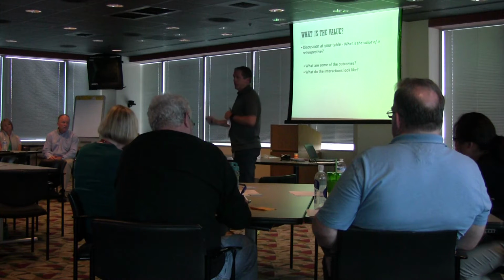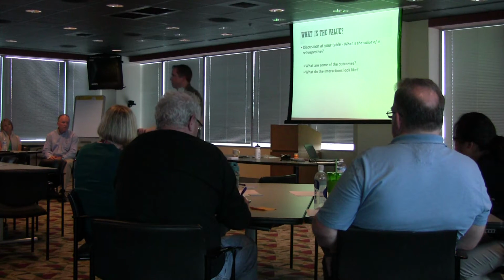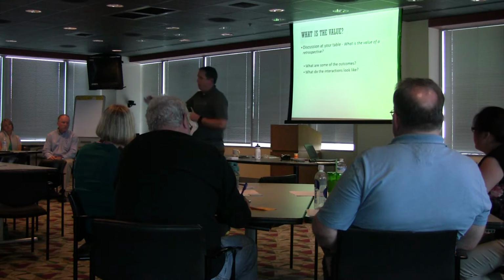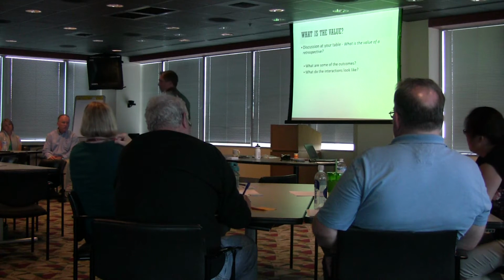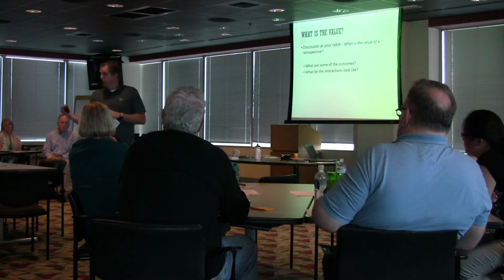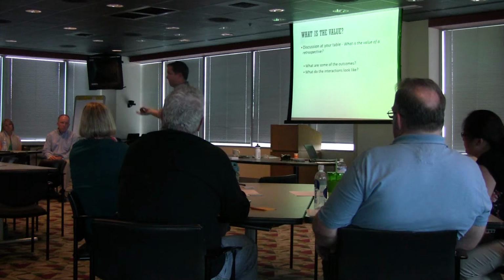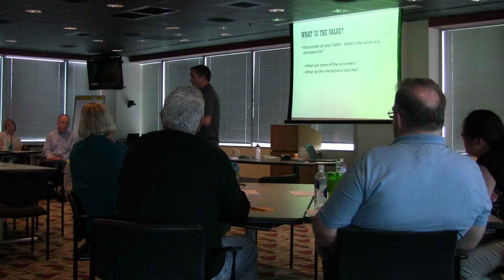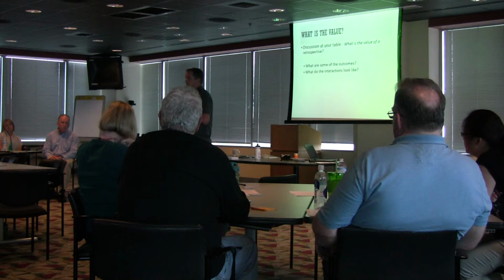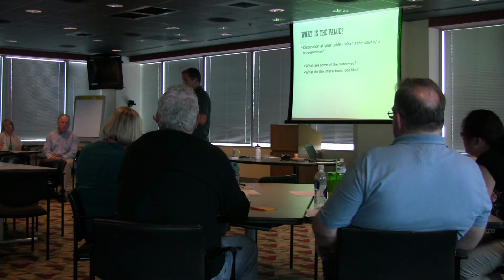So make sure it's something that's actionable, something that you will commit to, just as you would commit to working on your product backlog items. Because I've got to tell you, if I'm a member of a team that says collaboration is the number one issue, we need to collaborate better. Awesome, let's work on that. Let's figure out some ways to collaborate better and define what that is, right? Be specific. What does that look like? What does it mean? Because I want to have a target in the same way that I have acceptance criteria for user stories, right? What's my target? Yeah, we collaborated better. How?